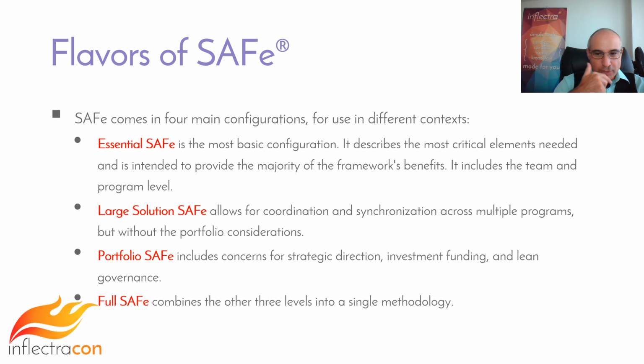Large Solution SAFe is when you have multiple programs, but you're actually building out a very large integrated set of products and solutions that really work together. So basically, you've got multiple programs that form part of a giant solution. Portfolio SAFe is where you have lots of different programs in your organization. They're separate from each other, but they do have to compete for money, time, and resources. And so you're using a portfolio approach where you want to balance the investment and the time, but the programs in that portfolio, for the most part, are independent of each other from a requirement and dependency standpoint. They can be managed separately. It's more that you're investing in them and understanding that if you invest more in this one, that always has an impact on the other one because resources are finite. So it's a resource-driven approach, whereas Large Solution is much more schedule and value-driven.